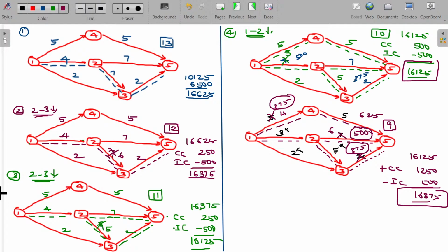Like the earlier chapter, you finish up. Thereafter, find out each and every route, especially the critical path and the activities falling in the critical path. Try to reduce those critical activities' durations to reduce the project duration. Every time you reduce the duration by a day or two, the cost will also be reduced. If the cost is reversed or increased, then you have to be doubly cautious there.